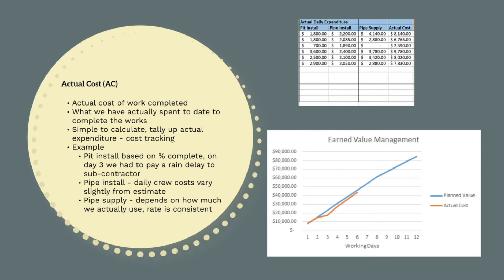As we are using a subcontractor for the pit install, actual cost is calculated by just taking a percentage of each of the pit install amounts, factoring in a rain delay on day 3 that we had to pay the subcontractor. For pipe install, the actual costs are just the actual costs we paid for our civil crew. This varies slightly depending on fuel and consumables used and overtime amounts worked. Finally, actual cost of pipe supply is done by using the pipe supply rate and the amount of meters installed. Together, these give us a daily actual cost of the work completed and allow us to plot the summary of actual costs.